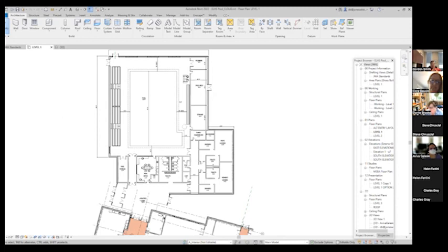Right. I think it's also important, Charles, to note that we have to permit the pool project and the school project separately. Otherwise, we will run afoul of the MSBA. So we do really need to consider them from a code standpoint as two separate projects. And for all we know, they happen at different moments or they don't get passed by the voters. So maybe the pool is not something the voters vote for. So we have to be sure that the two are by code independent as well.